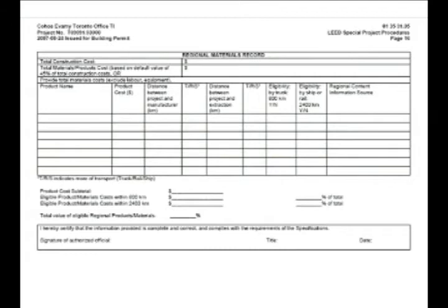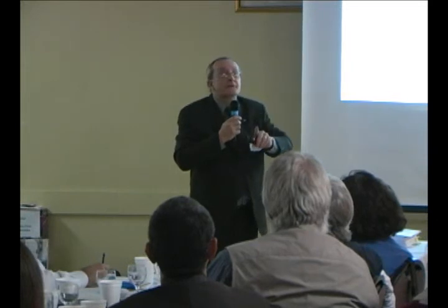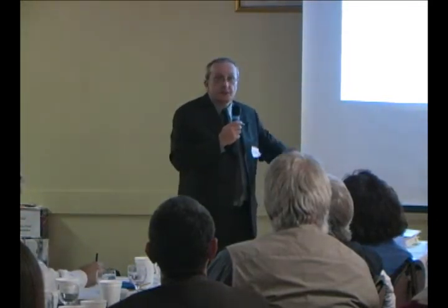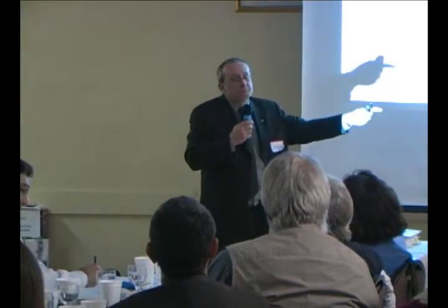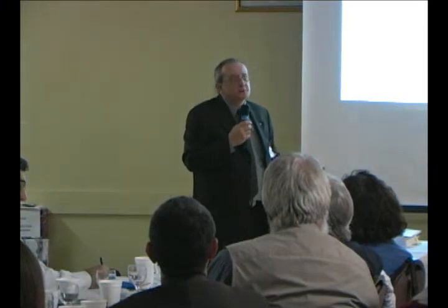And again, it's different. It's 800 kilometers if it's by truck, 2,400 kilometers if it's by rail. This has to be taken into account. But you can only prove it if you've got the waybill to show how it was transported. You just can't say, well, this came from Ottawa, it must have come by rail. If it came by truck, sorry, you lose.